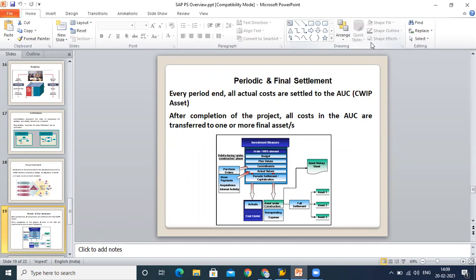Whenever we settle any project, it generates one AUC—Asset Under Construction. What is your objective of the project? Our objective is to generate something new. Like when we're talking about the building part, our objective is to construct the building—that is a kind of asset for the organization. Whatever we are generating is an asset, whether it is a tangible or intangible asset. We can have periodic settlement or final settlement, and the selection is purely based on the duration of your project and your business need.